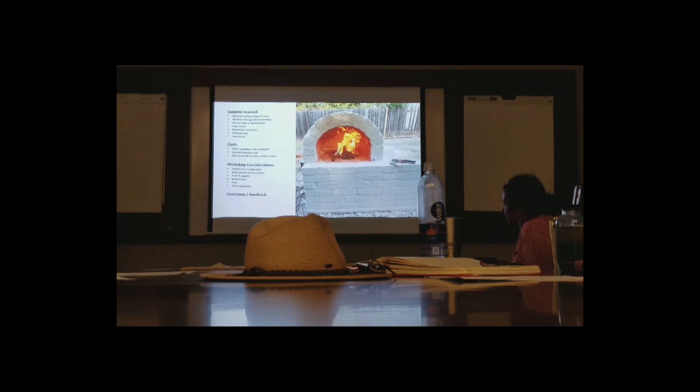And clay content, what's going into your blocks in general, like solar content. Remember the head joints. Everything else I calculated out to the inch, but I did not think about the head joints. I thought about the bed joints, but not the head joints. In the end, with the Horno, it doesn't really change anything, but the bigger a project gets, the more it grows, because you have to add that head joint.